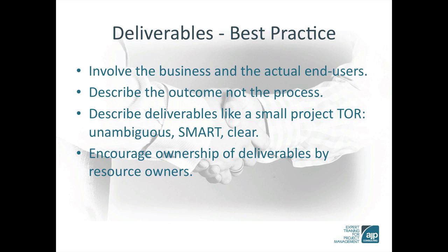The objective of this module is to provide confidence and competence to decompose, describe and get support for product deliverables. Let's conclude with some best practice tips. The PM is responsible for the overall scope and should be robust in the description of objectives and success criteria. However, it's in the involvement of the stakeholders, and in particular the end users and those responsible for delivering them, where we gain and maintain commitment. A useful tool here is to run a project definition workshop with the end users and the subject matter experts to develop and agree each of the deliverables.